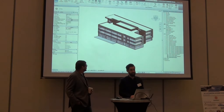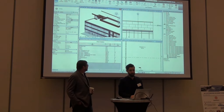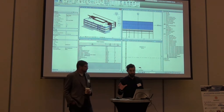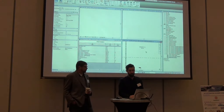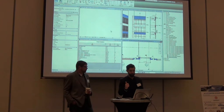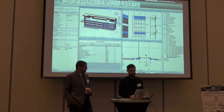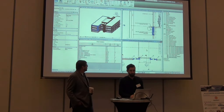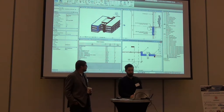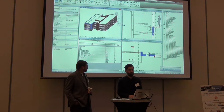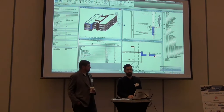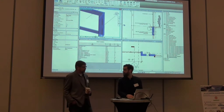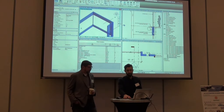Understanding the building this way gives you a much more comprehensive look. You're looking at that wall system in 3D, in elevation, in plan view, and in the wall schedule — telling you, for example, that it's 9,000 square feet of stone wall panel. This is where we are now, and we're going to look at how we get this information out of the architect's and design team's model and into a more comprehensive estimate.